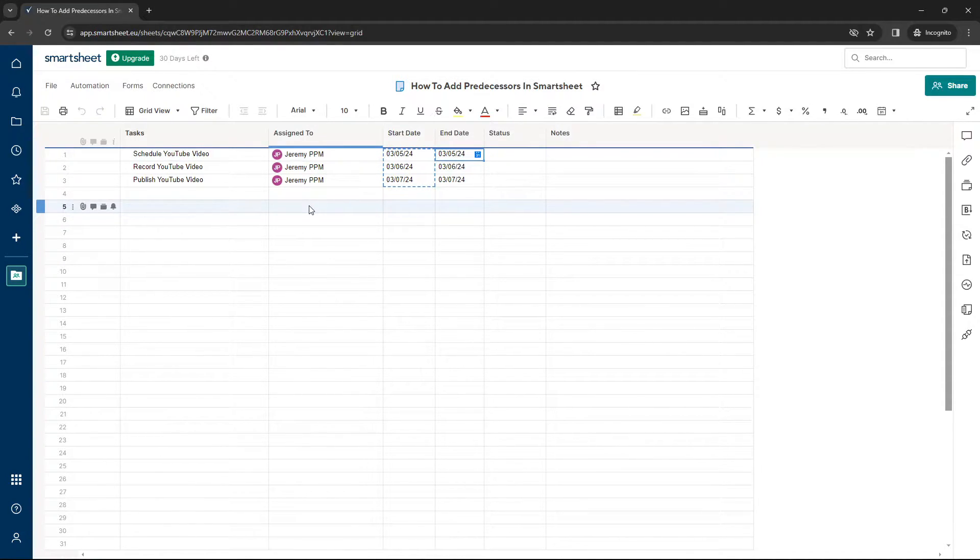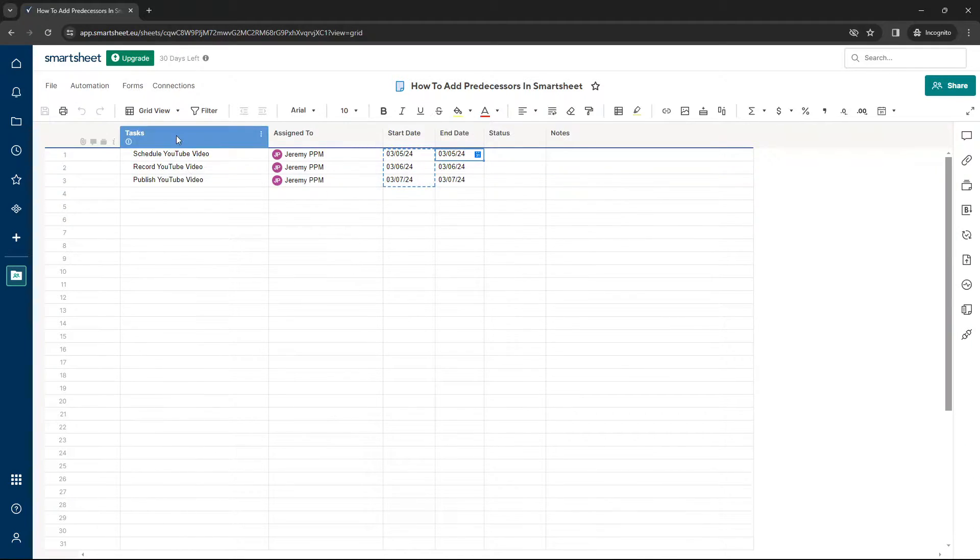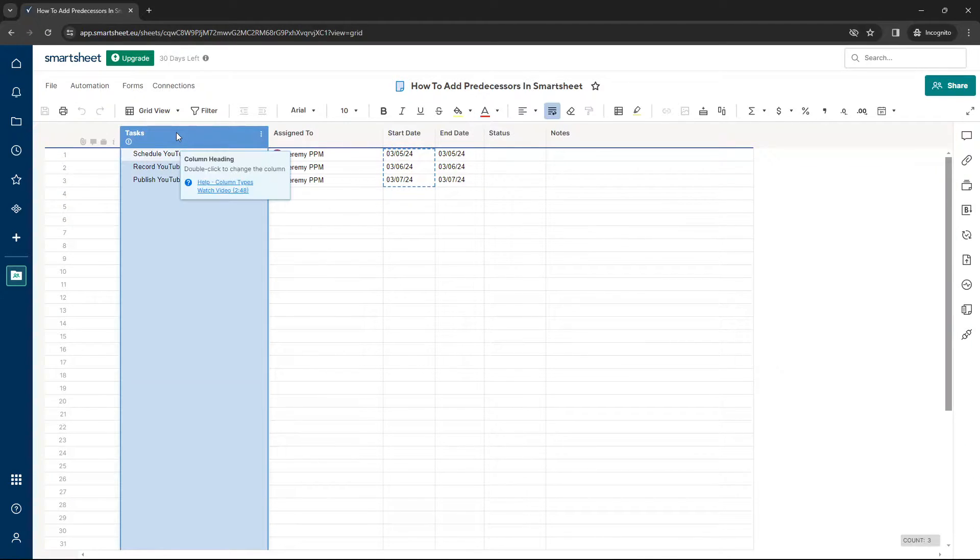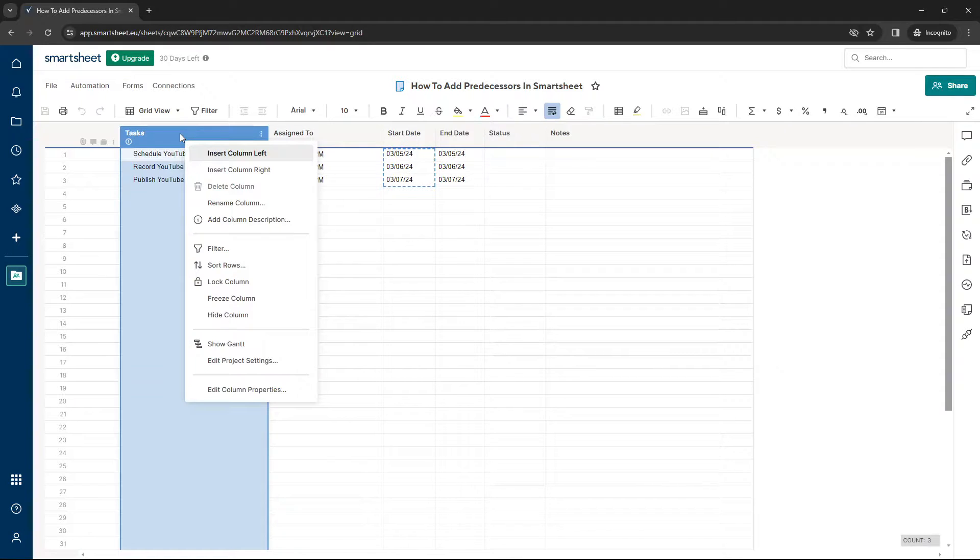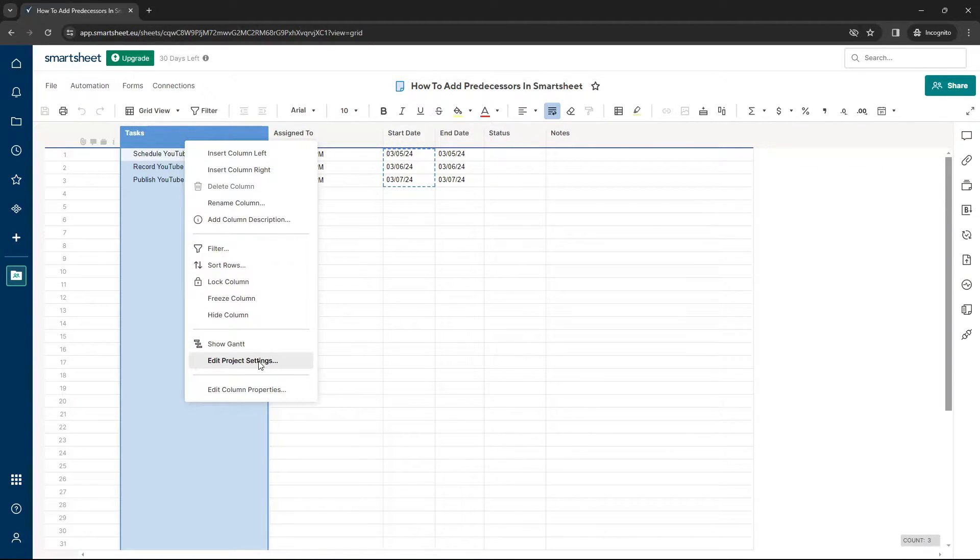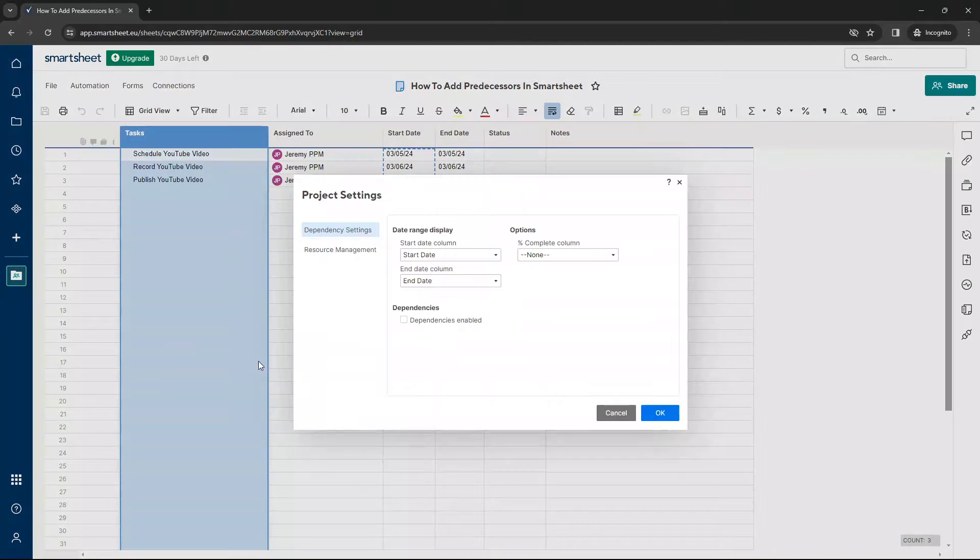So what you need to do to add predecessors in Smartsheet, locate your primary column. Select it. Left-click on your mouse. You want to right-click. And then you want to click on Edit Project Settings.